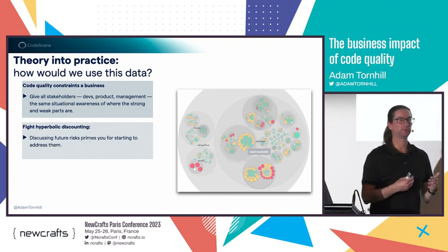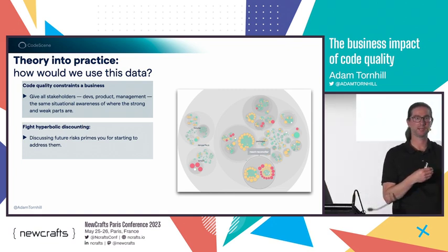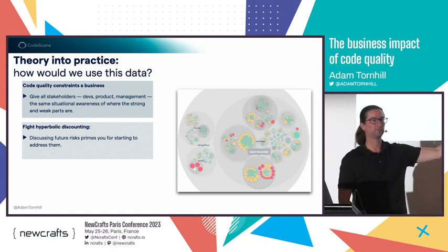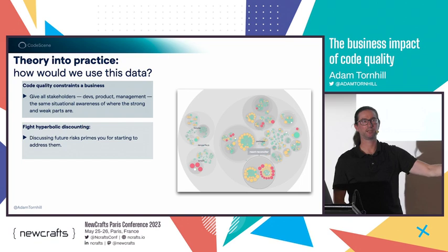So we can now either choose to accept that risk and simply plan additional time because we know we're going to need it, or even better, we can take a step back and use this as an opportunity to refactor the code so that we can deliver any future features in a safe way and a much more efficient way.